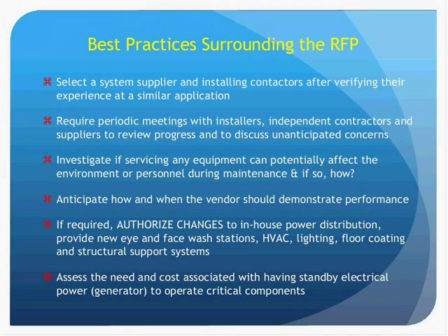The end user will assess all proposals received in-house, perhaps also requesting advice using independent legal and technical professionals. Following a thorough investigation of each supplier, the end user will select an environmental control system supplier for their application. The selection process should include discussions with each supplier, visiting similar operations by that supplier elsewhere, evaluating costs, and visiting the supplier's assembly site. Here are suggestions that are considered best practice by experienced professionals.